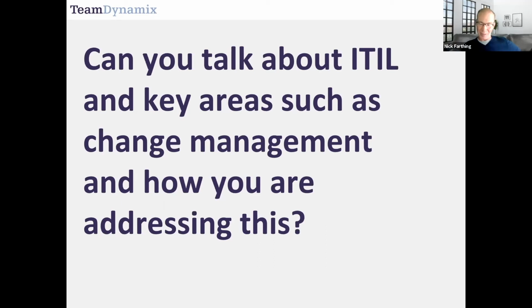And fast forward a little bit, we had some outages with our core ERP and our website that occurred around Black Friday and Cyber Monday, which for a furniture or any retailer, that's really bad. But what made this worse was that the outages that we caused, it was caused by us. So after we resolved everything, the retrospective occurred, and the IT team unanimously agreed that if we had a formal change management process in place, we could have either prevented or greatly reduced the severity of those outages.